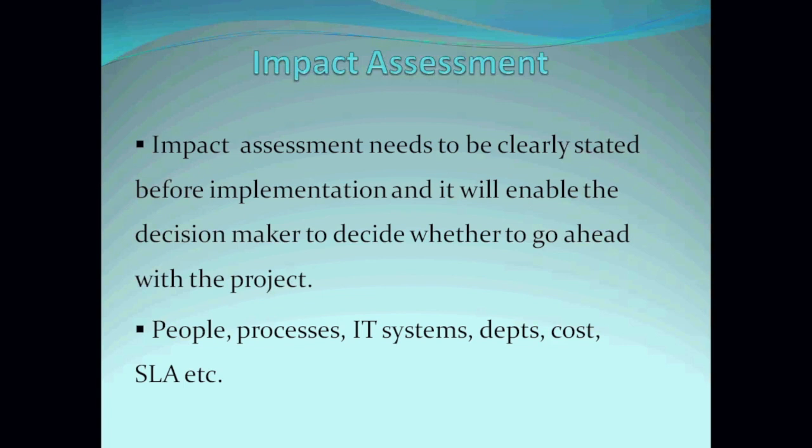It could be anything, so they have to make sure they check all the key areas, to see the impact the project is going to have on people, technology, data, and also their processes. And once they have all those results, then they can say, we cannot proceed with this project. Probably, looking at all those outcomes, they may say the risk is high and there's no way we can mitigate it, then we may have to abandon this project. And if they feel they can mitigate those risks, then they will make a decision to progress.